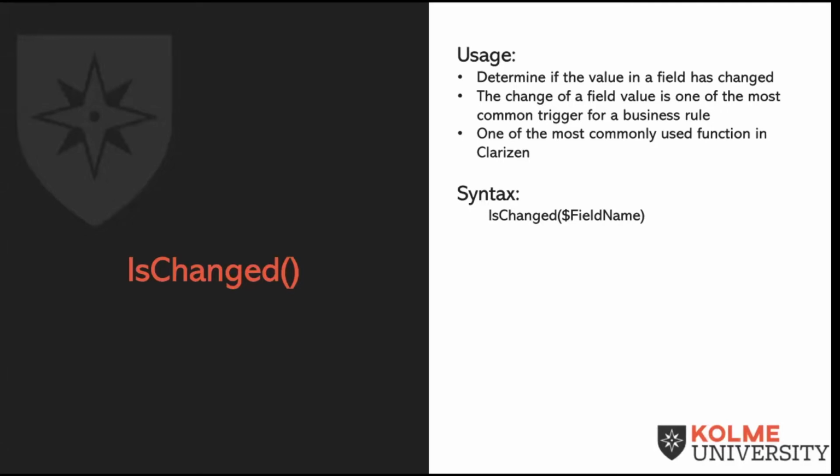So imagine you have a workflow rule and it performs some action every time somebody changes a value on a project. Maybe you want, when the state of the project changes, to notify somebody. If you don't use IsChanged to specifically monitor a change to the status field, then any time any change is made to that object, it's going to trigger the workflow rule. So you can imagine if the work changes, you change the description, you change any other attribute, it would trigger the workflow rule, which is not very efficient and usually probably not what we're looking for.